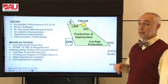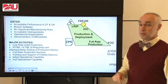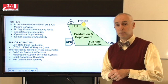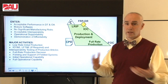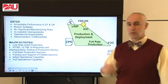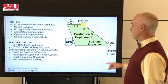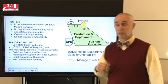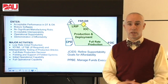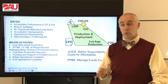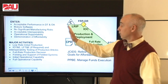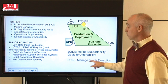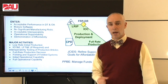Once we've got everything deployed and it's ready to go to war, that's full operational capability. Generally speaking, the user will define a small set — usually a unit's worth of equipment — that is good enough for initial operational capability. Once that unit is equipped, trained, and ready to go to war, that's initial operational capability; once everything's out there, it's full operational capability. The Capability Production Document from Milestone C is really the last time they'll formally go through the JCIDS process. And in PPBE, we're still going to be managing our funds execution and making sure that we're in those out-years as well.